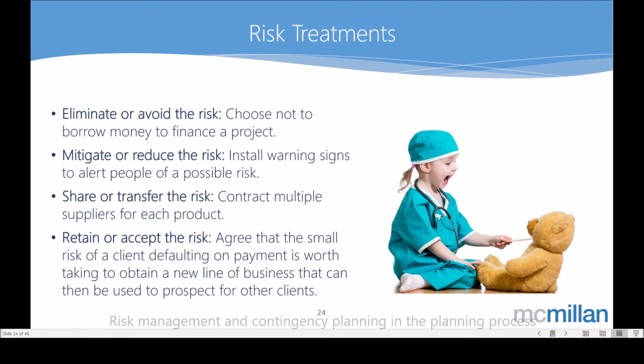It might cost us $5 extra, but it won't matter. And Officeworks have always got them in stock. Worst case, if Officeworks don't have it, we'll pick it up at another stationery supplier. Then we will just accept it, because we don't need to spend any more energy in dealing with that. However, that's different to if it's really high. If that's the case, we need to do something about it, because that would be a duty of care to